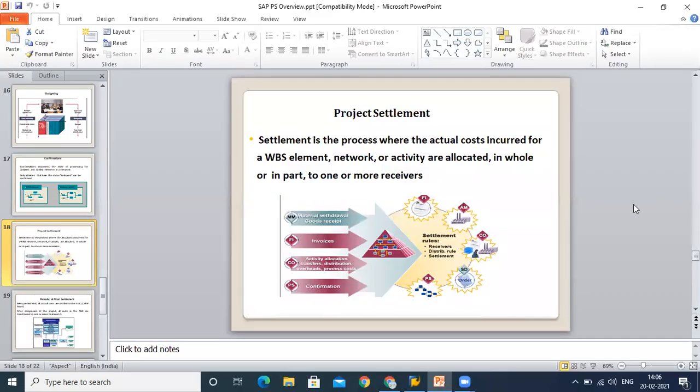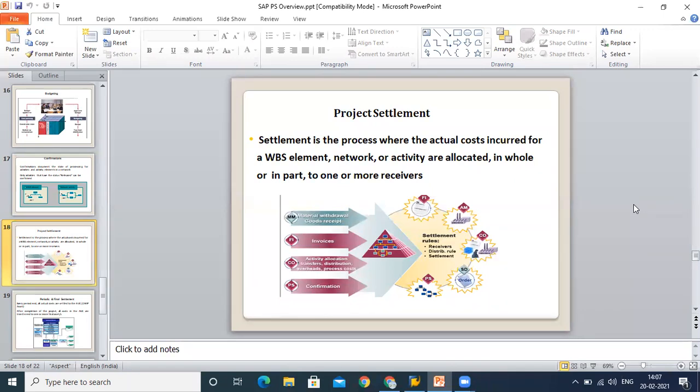Now when you have planning and you have confirmed something, it means you are about to end your project. The last step is called project settlement. Settlement is the process where actual cost incurred for the WBS network activities are allocated in whole or in part to one or more receivers. In your project structure, there are multiple WBS and you have booked the cost at multiple WBS. At the time of settlement activity, you simply collect all this cost and collect it to one big area.